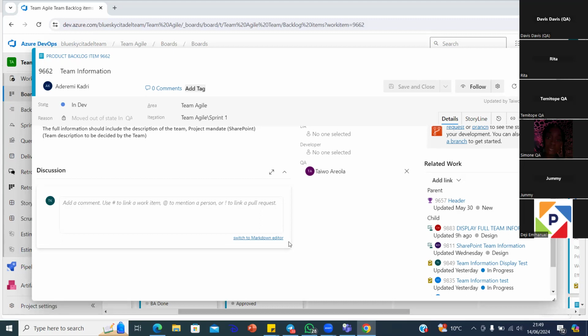At that time, the bug and the story become like one entity: you test the bug, and after you test the bug, you go back to retest the story. If everything is fine, then both of them move into done. That is the best approach.